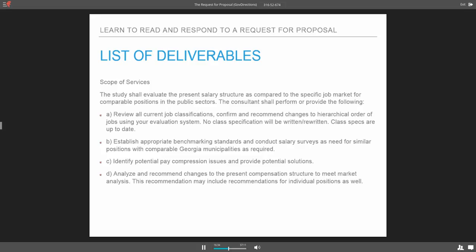So in this type of consulting arrangement, I might go in and say, at step A, once that's completed, I expect you to compensate me with 25% of my proposal costs. Or as you go through, it could be 10%. There's an expectation, so that both you and the agency that's hiring you, or awarding you the contract, understand what you're expecting, and then they can speak back to that.